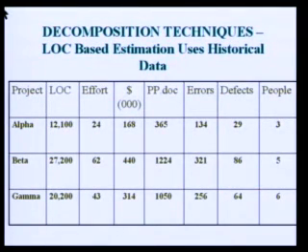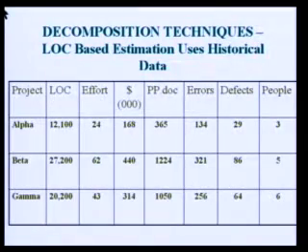Then how many people were used in this project? 3 people. So there is one important thing here. Effort is 24, people are 3. Effort 24 means 24 person-months. So 24 people used for 1 month. Here you are using 3 people, so you should use them for 8 months. That is the equivalent calculation. So 3 people used, and it has taken 8 months. The reason is we are saying 1 person is equal to 24 months. So if 1 person does the project, it is going to take 24 months. If 3 people do the project, it is going to take 8 months.